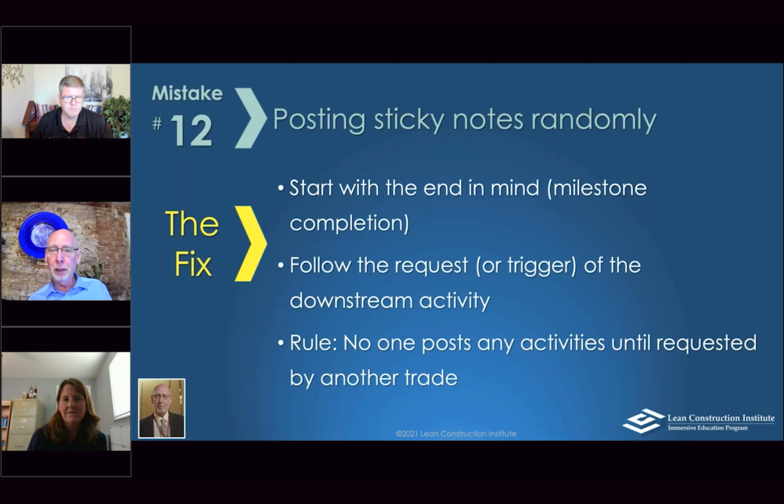And just like in good practices for professional aspects of what we do, there's a sequence to things, and we do a lot of them without really knowing why, but after some years of practice, we begin to understand why there are rules like don't touch anybody else's sticky note without their knowledge, permission, participation, input, awareness, and commitment to the fact that some task that has nothing to do with you is being reassigned by you for someone else who has to actually perform the task.